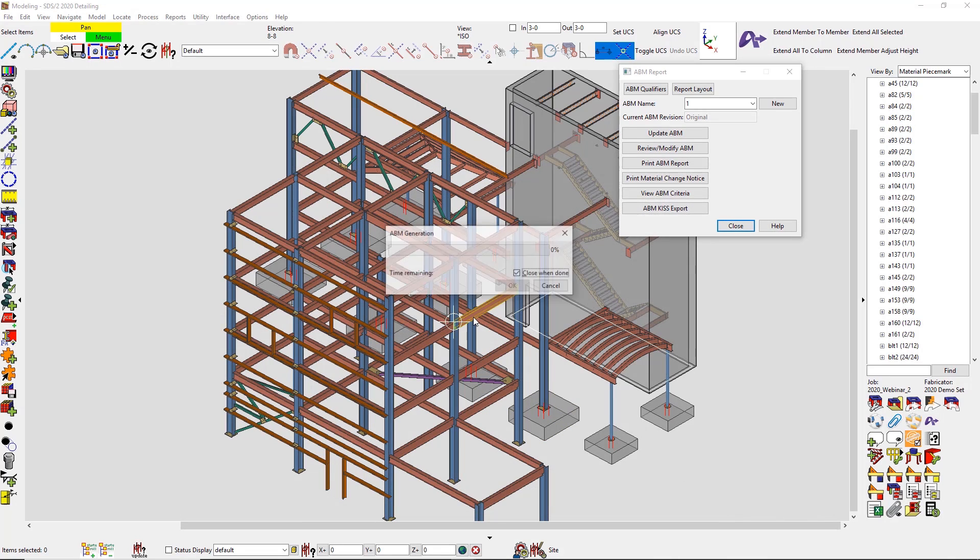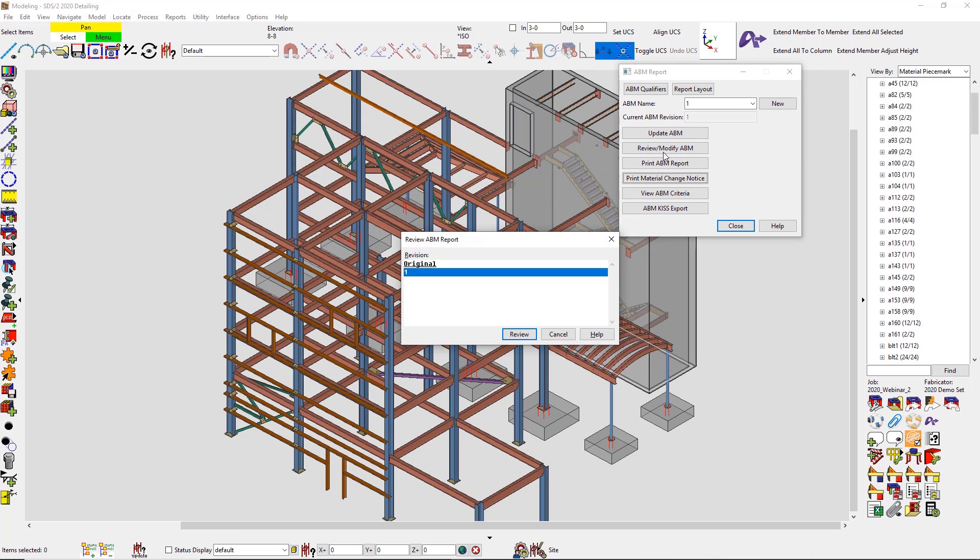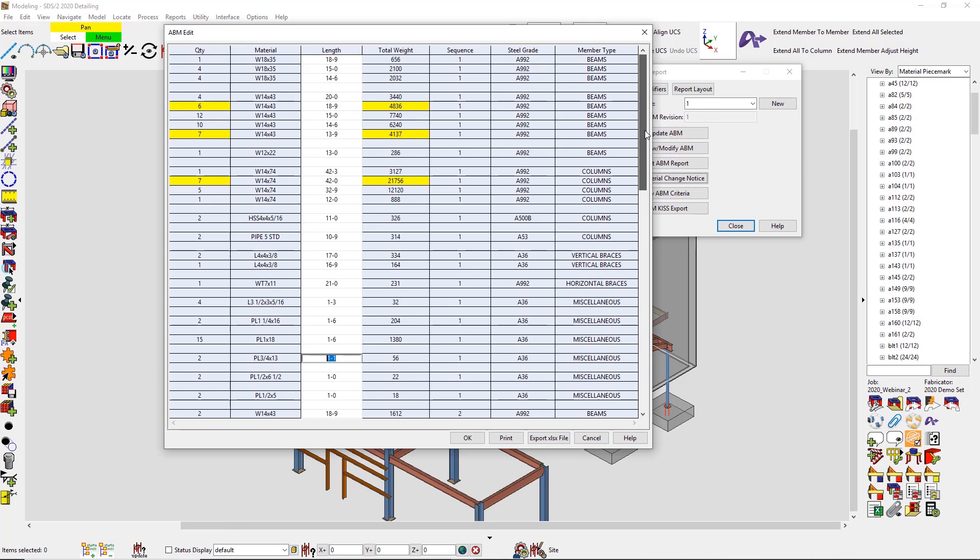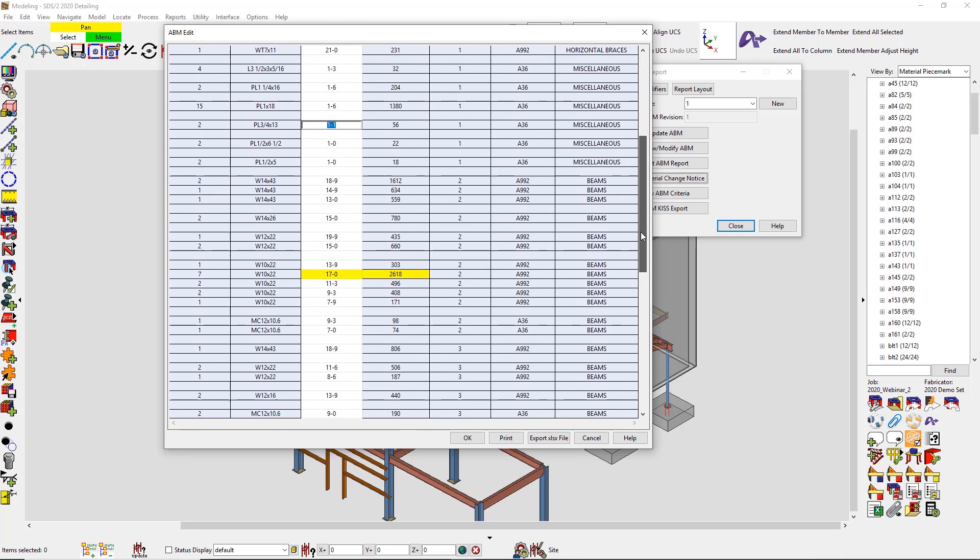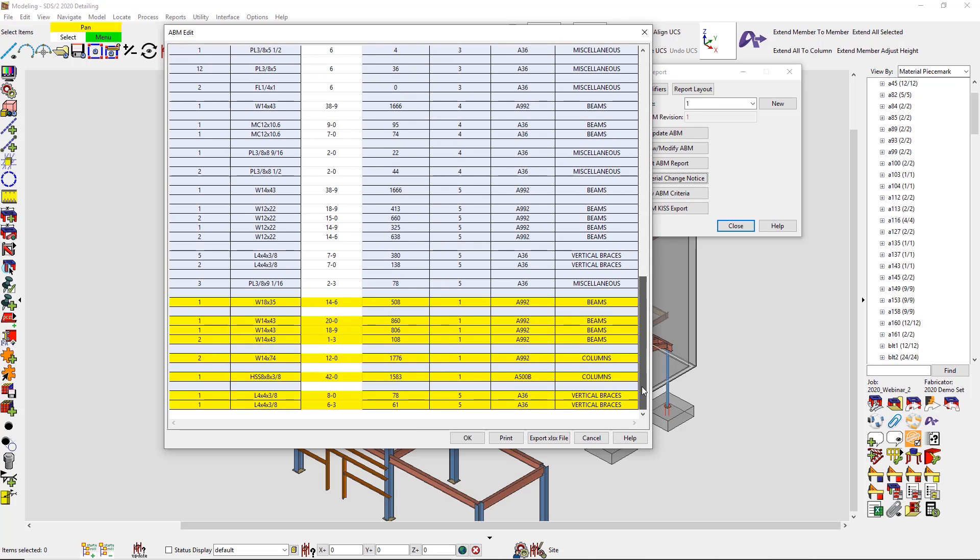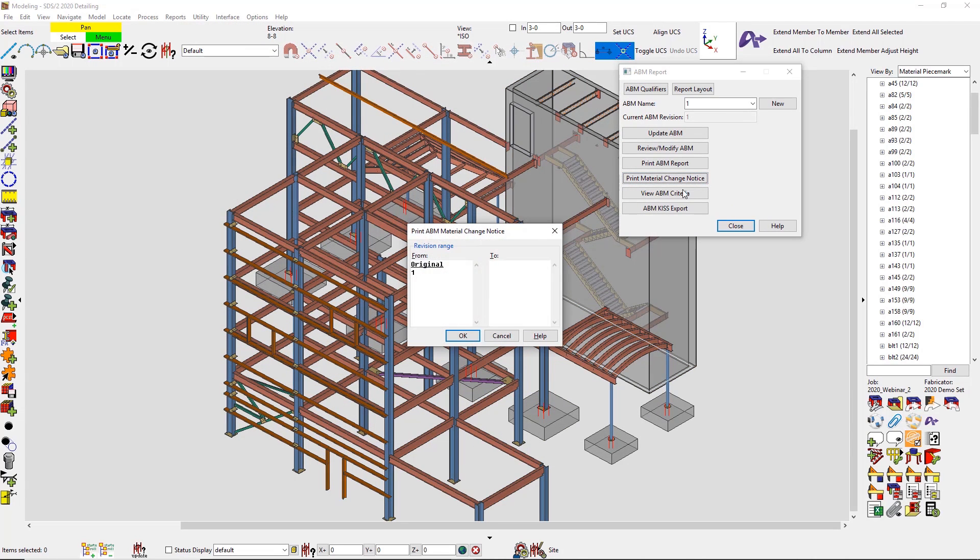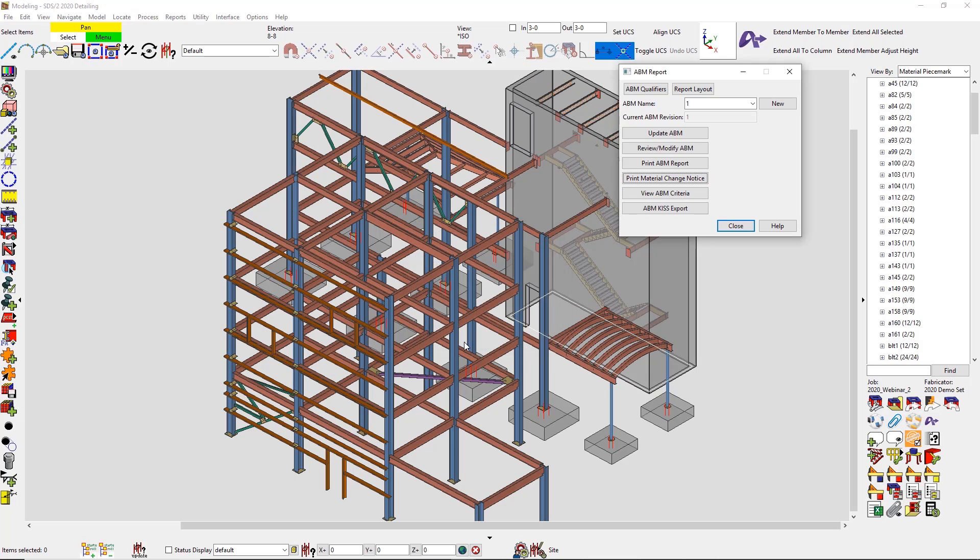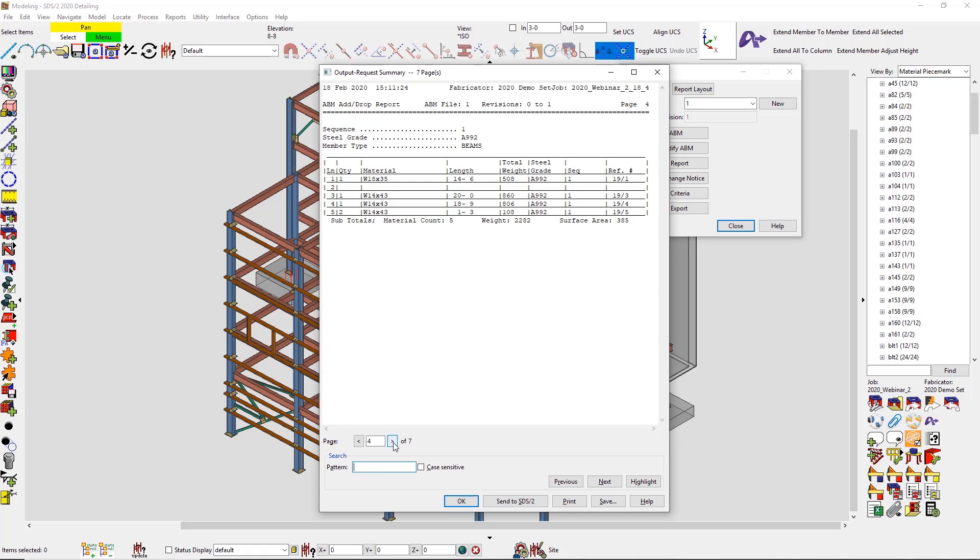When I go to review my new ABM, it's going to show me anything that's been modified since the previous ABM. I can get an even more detailed report if I want to see something from the original ABM to this ABM, and then it's going to print out a report for every single thing that's changed since the first ABM and this present one.